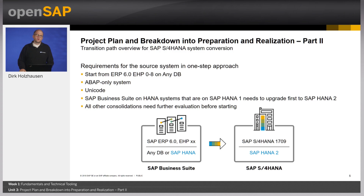The source system must be on ERP 6.0. Only ABAP systems can directly be converted to S4HANA — if there is a Java stack in place, the source system must be split first. The source system must already be on Unicode, because S4HANA only supports Unicode. If the system is already running on the HANA database, it needs to be on HANA version 2. If the direct one-step approach is not possible, then a two-step approach needs to be considered. In a nutshell, there is always a way to convert to SAP S4HANA, even for systems older than ERP 6.0. But the ways to convert are different depending on the source system, so the situation must be checked as part of the project preparation phase.